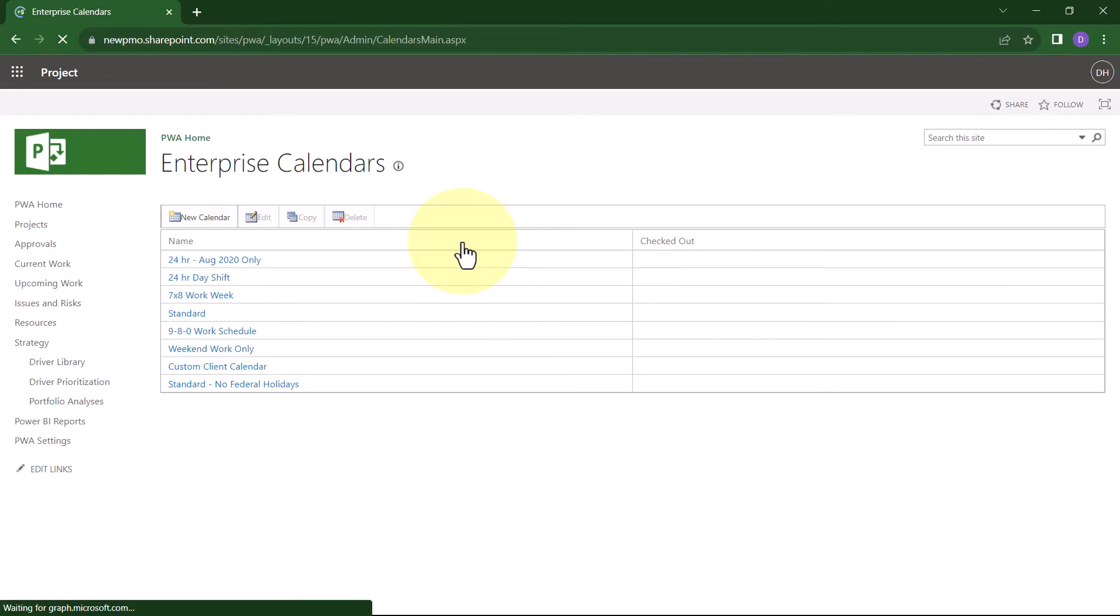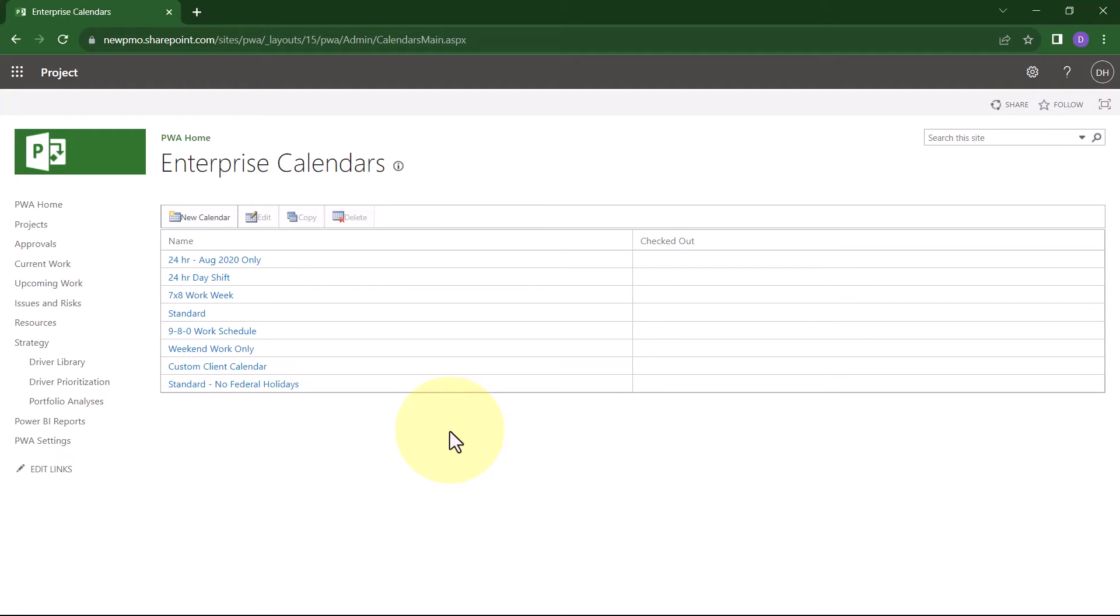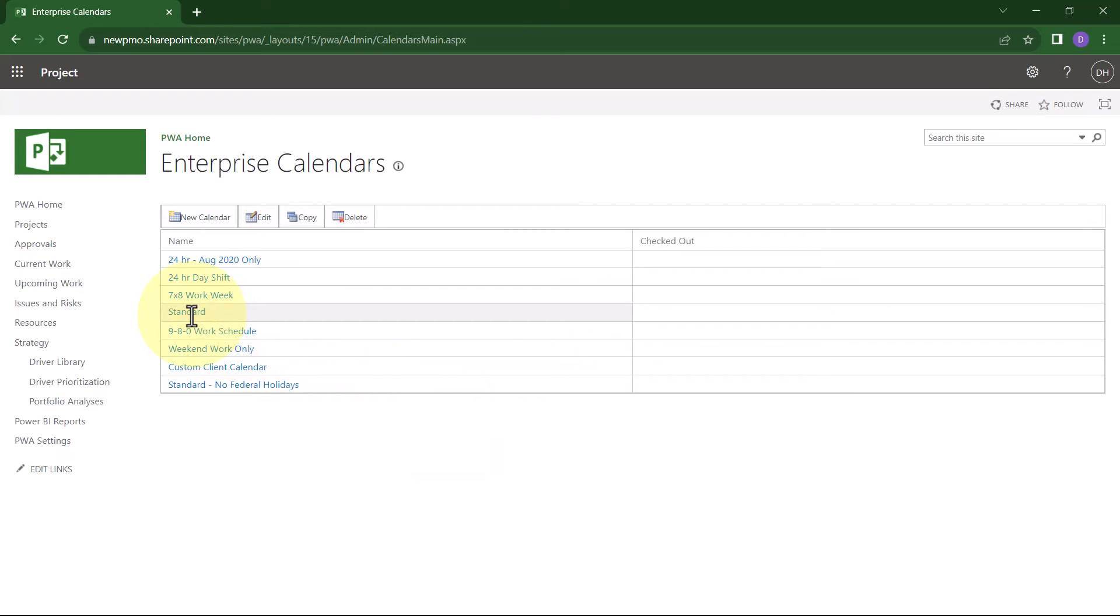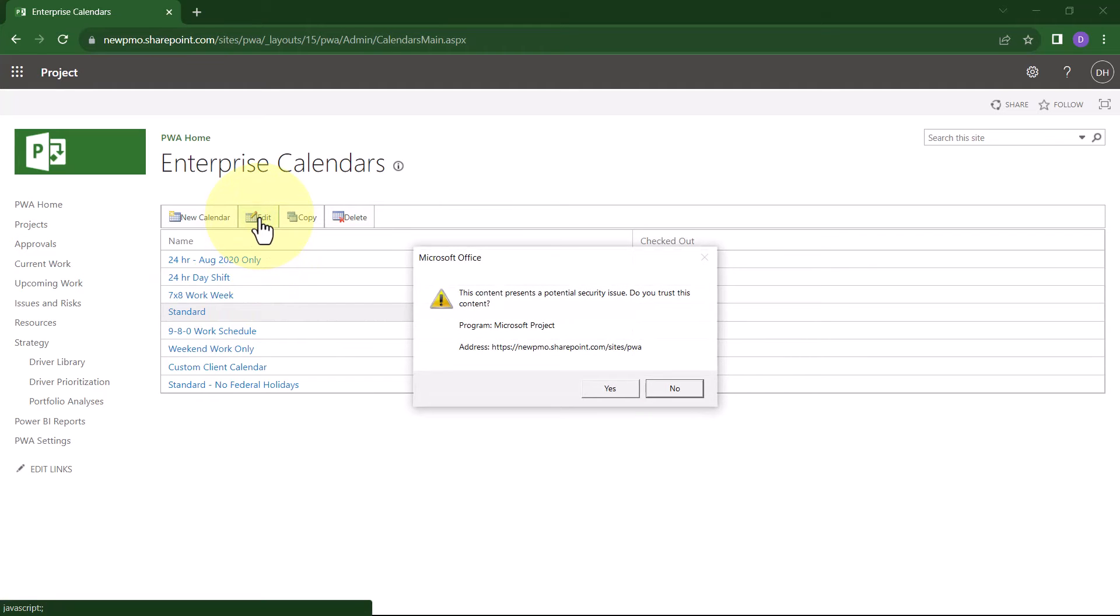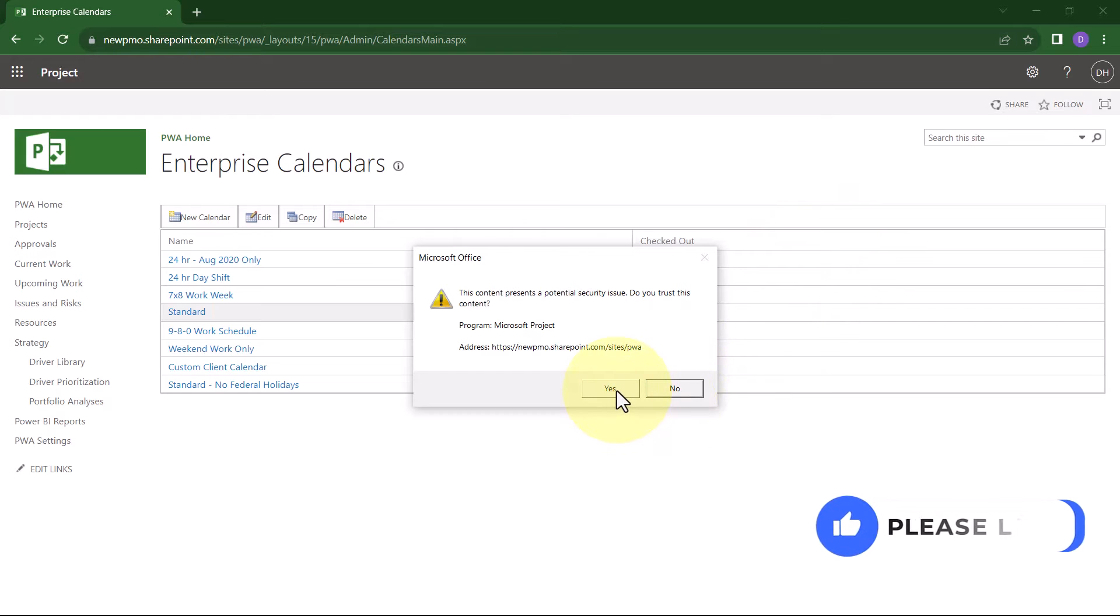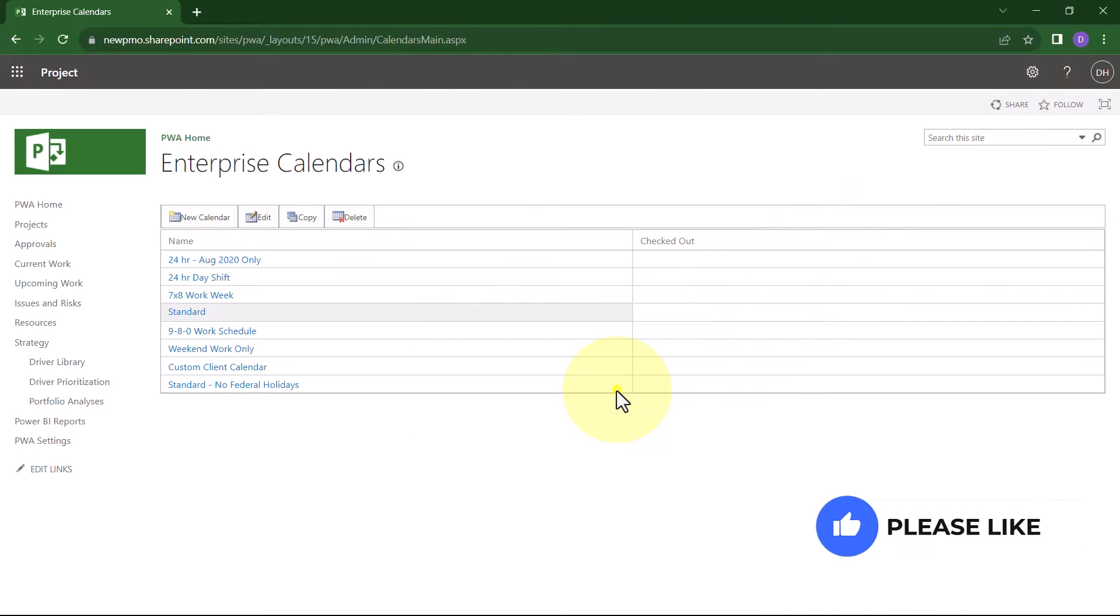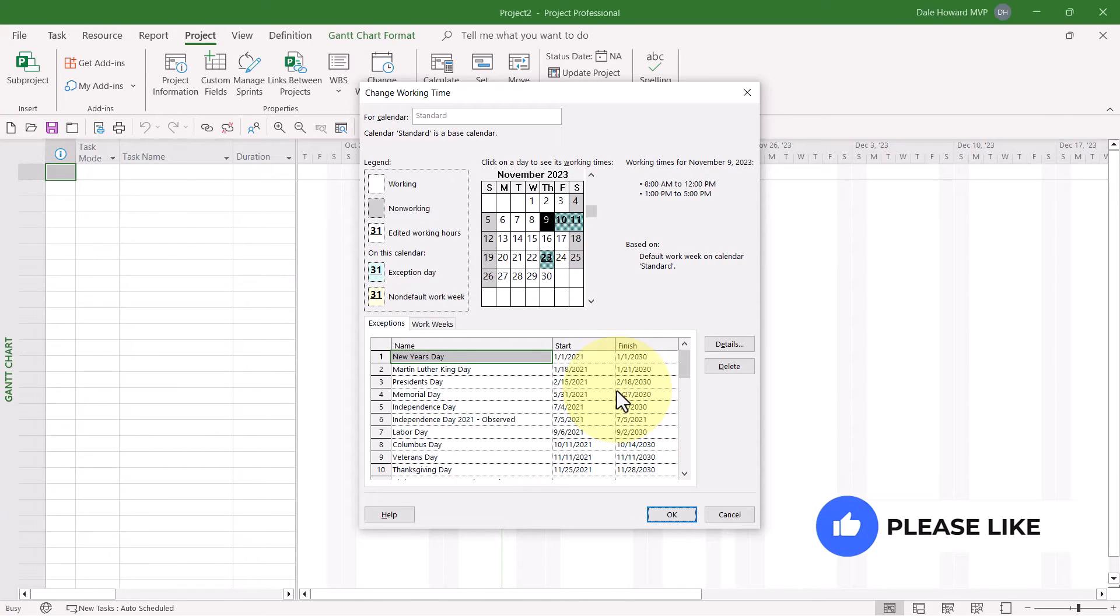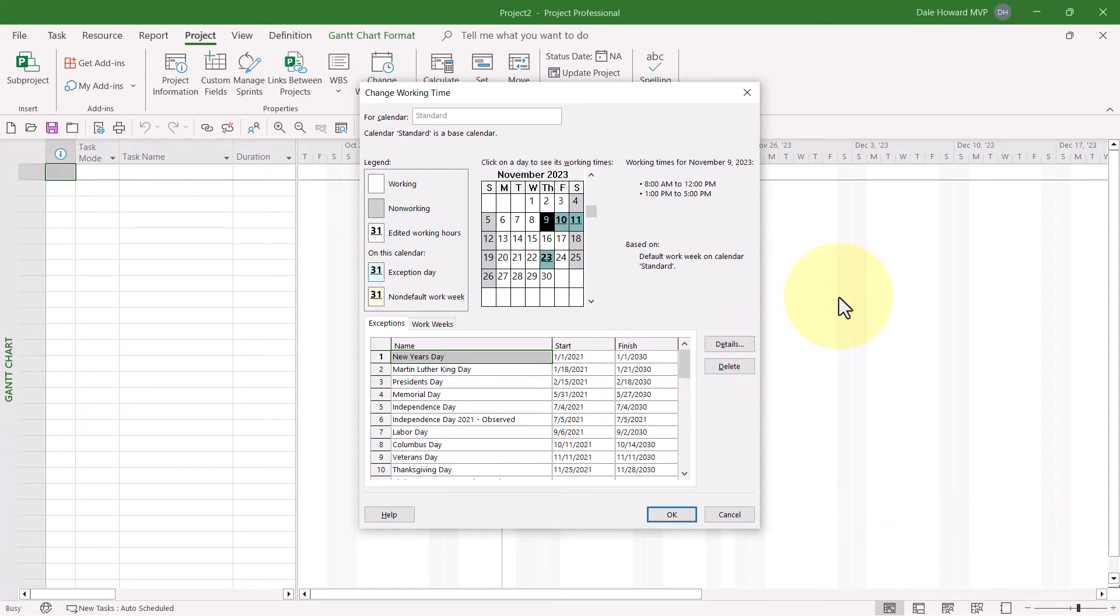On the Enterprise Calendars page, you'll find the Enterprise Standard Calendar plus any custom calendars you've created. To edit the Enterprise Standard Calendar, select it and click the Edit button. You will receive a security warning from the system. Click the Yes button, and the system will open the Enterprise Standard Calendar for editing.